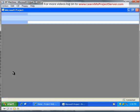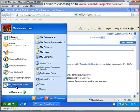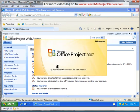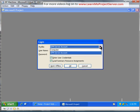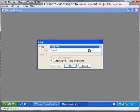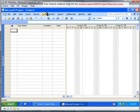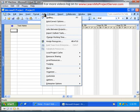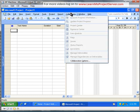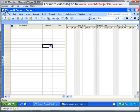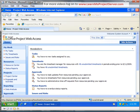Let me go ahead and show you if you're working in an offline mode. I'm selecting the computer profile, which is not connected to the Project Server. Go ahead and you can see that you don't have the connected status icon. I go to the tools and you can see that build team from enterprise and substitute results, document management. All these options are grayed out. And if you go to collaborate, none of the options are enabled. So you will be working on a standalone mode and you can go ahead and sync with the information with the Project Server when you're in the connected state.